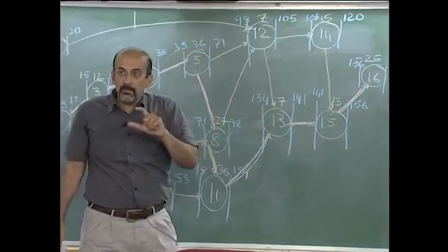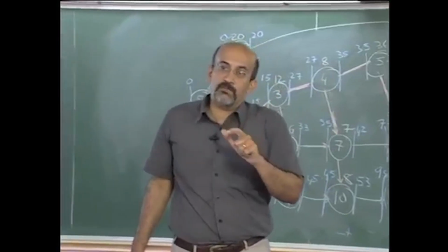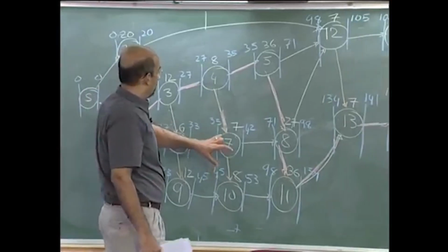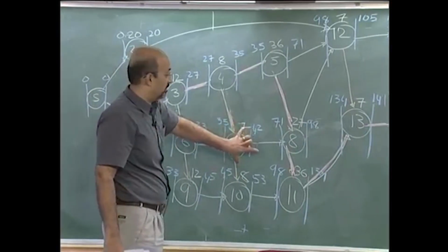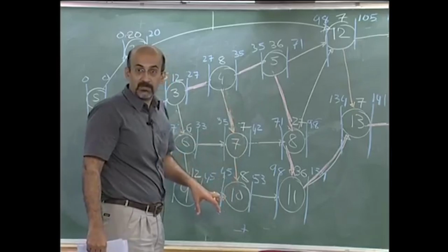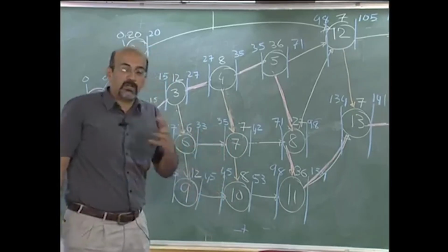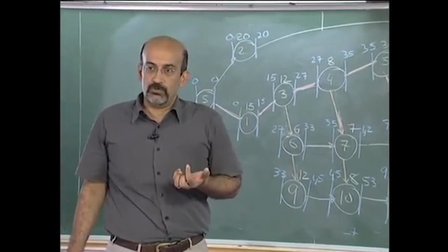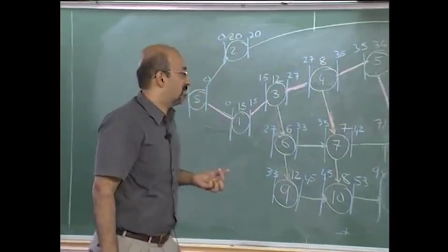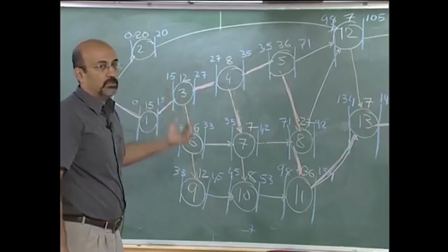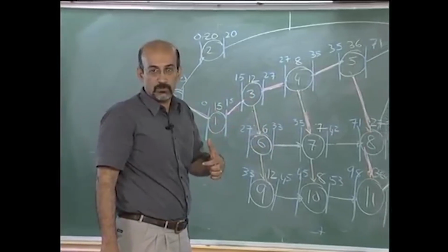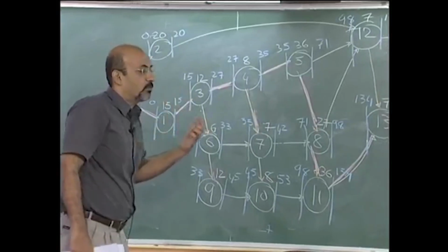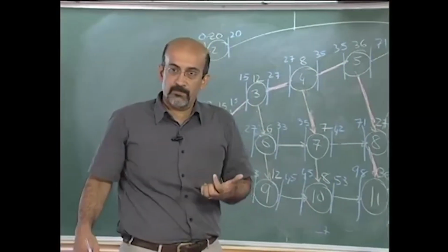So there has to be very close management of the network to understand what's critical and what's not critical. If you exceed the duration, you exceed the float, then another path becomes critical. So these kinds of issues require closer management of the network, and that is acceptable because you are using fewer resources. We'll start the next class with a discussion on the floats you got on this and any questions you have on the floats, and how we would use the float to see if there's any pattern or what we can do from a project management perspective.